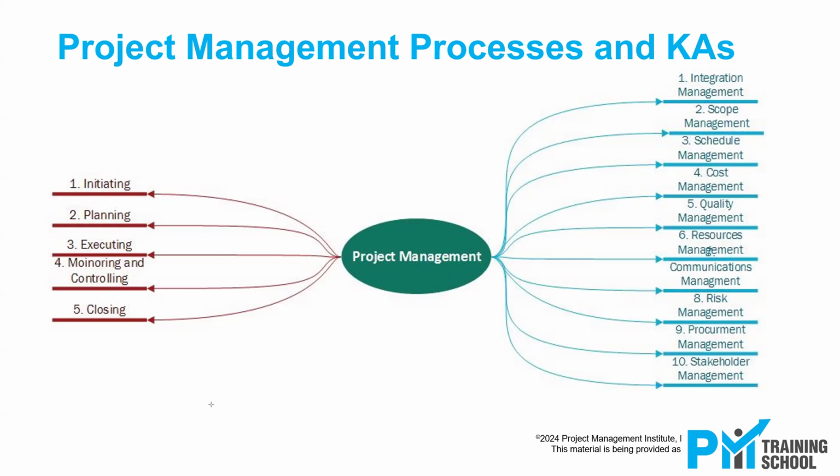A timeline is not exactly a schedule, but as you said earlier, it is kind of a straight line on which the events are occurring. Like this is my project on a straight line, and on this straight line I have the start of the project and the end of the project. And then I ask, what are the major things which I need? What are the major milestones? Maybe there is a milestone here, here, and here. I define all the milestones which are actually defined in a contract, right? Now based on that, I start to divide this project into various phases.